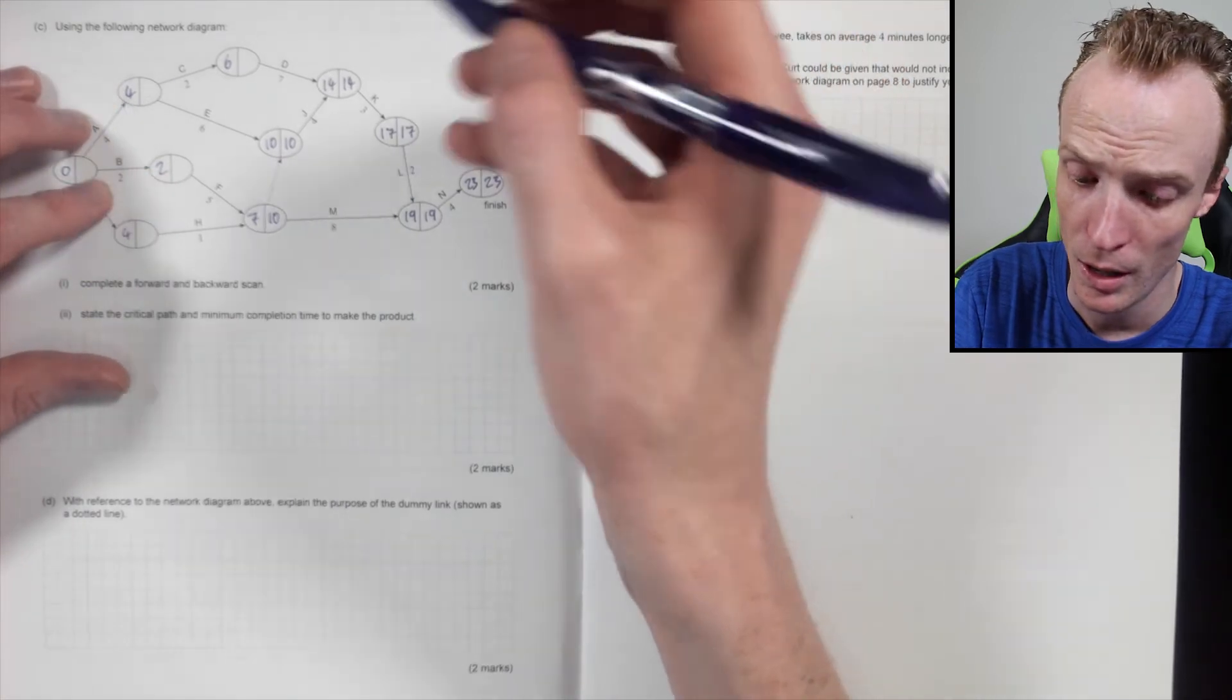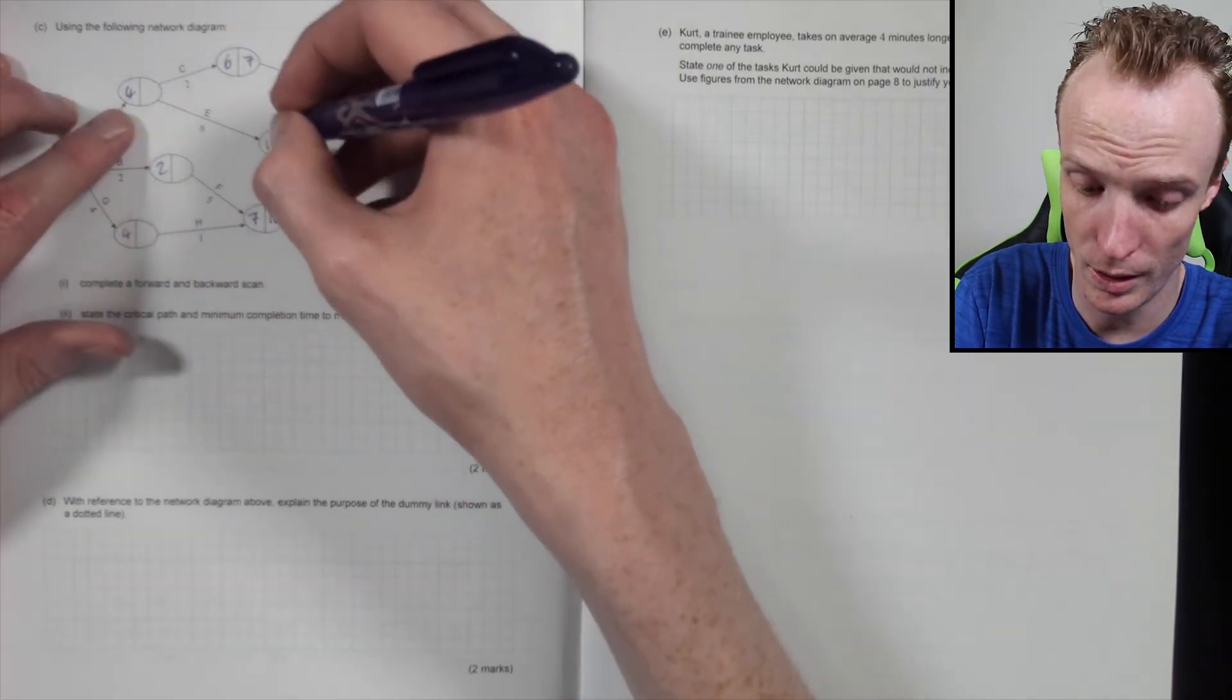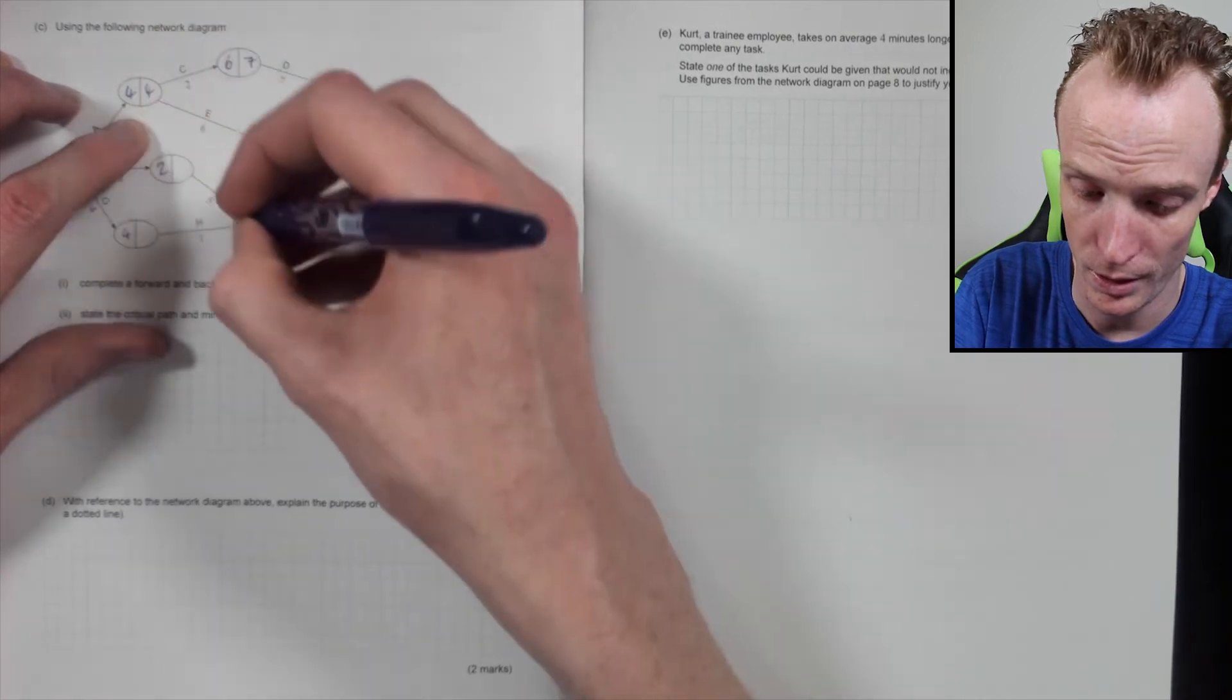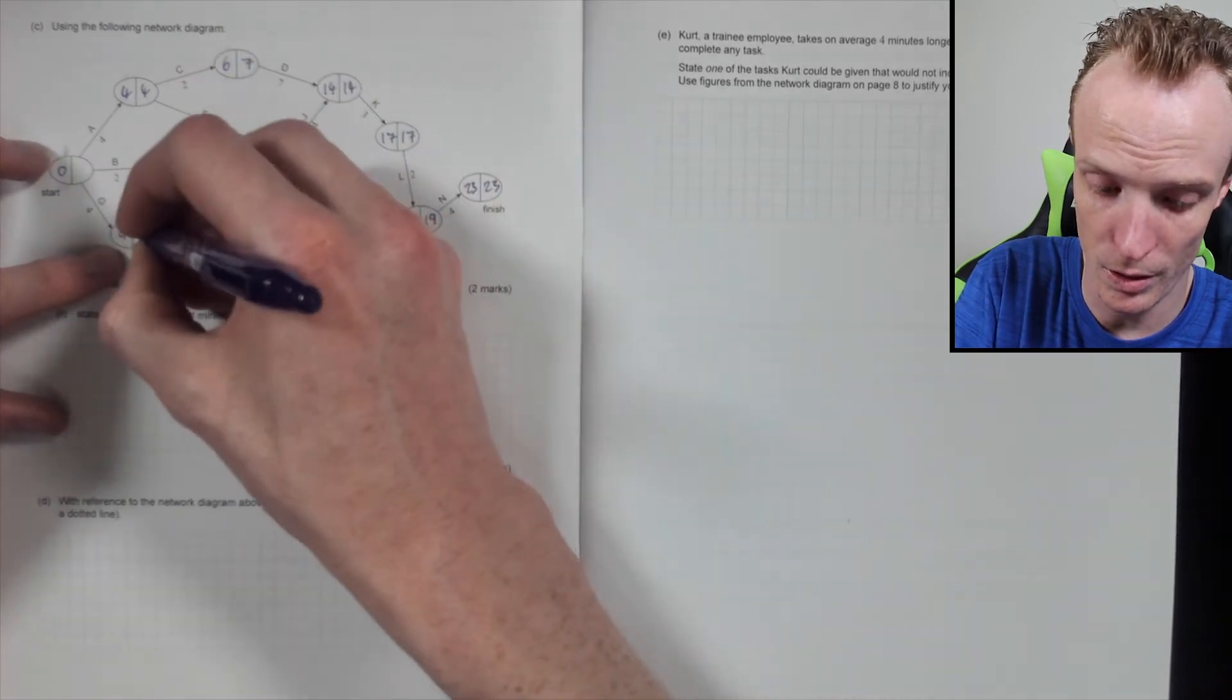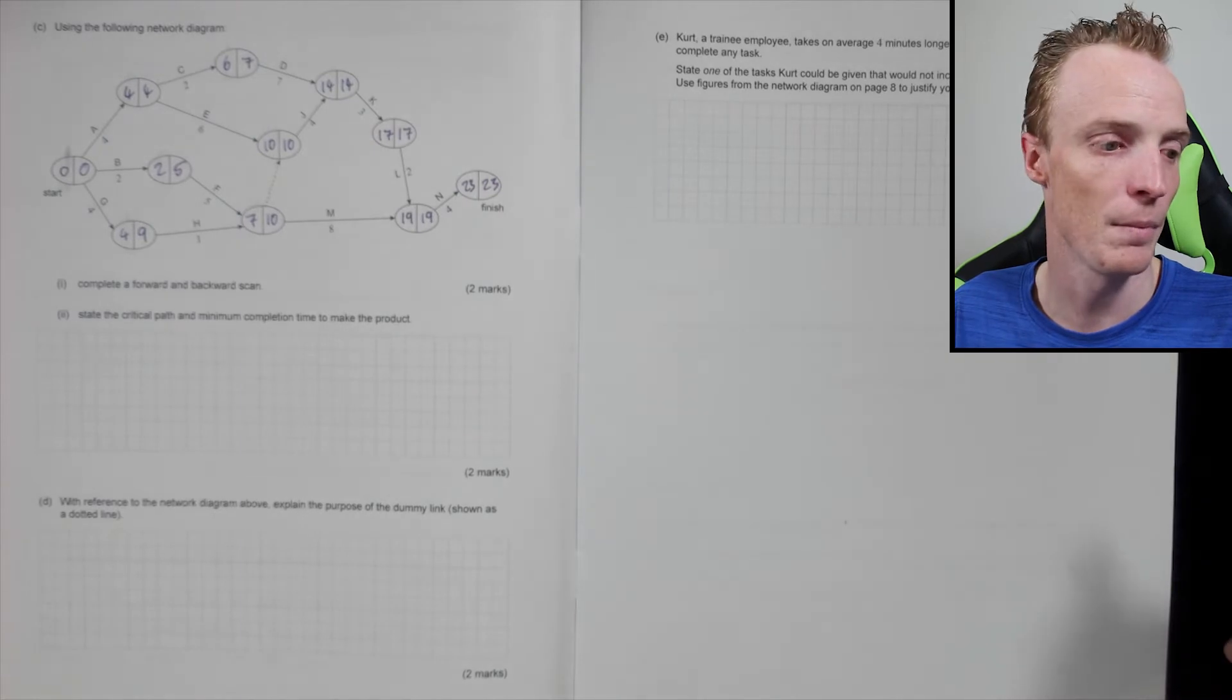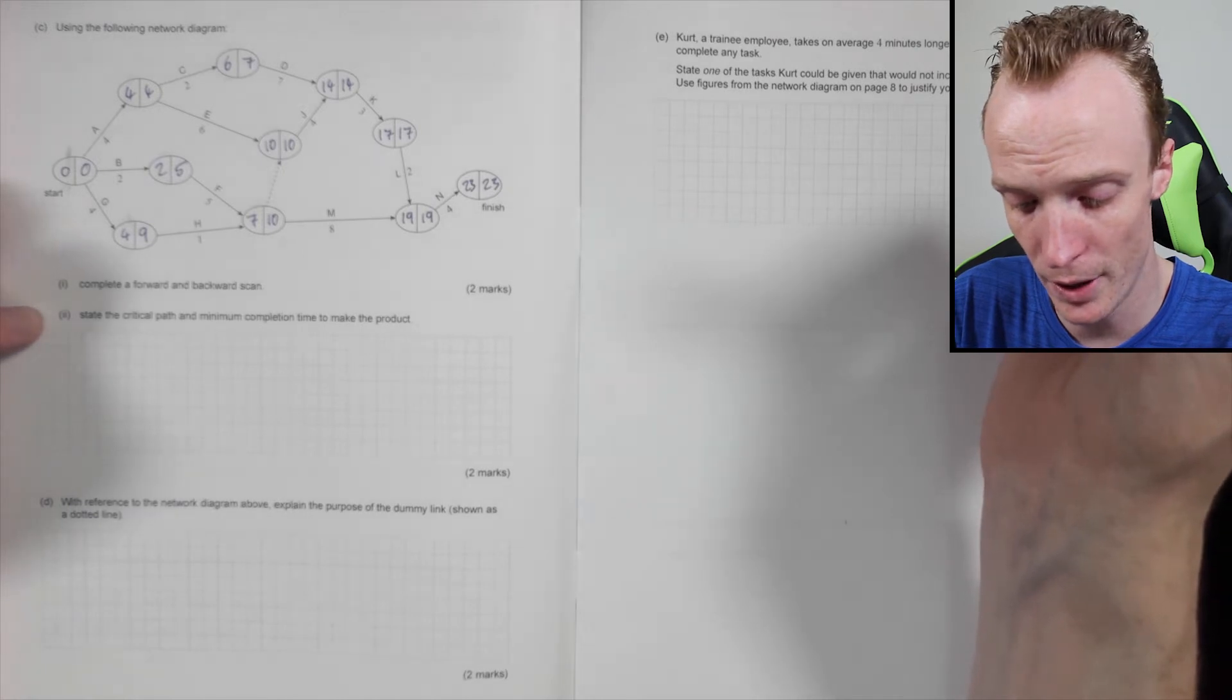So 23 take 4 will be 19. 19 take 2 will be 17. 17 take 3 will be 14. 14 take 4 will be 10, and then that'll be 10 going this way. 19 take 8 will be 11, so I'll be looking for the 10 value just in here. 14 take 7 will be 7. 10 take 6 will be 4. 7 take 2 is 5, so it'll be the 4 there. 10 take 5 will be 5. 10 take 1 will be 9, and then that'll be zero.